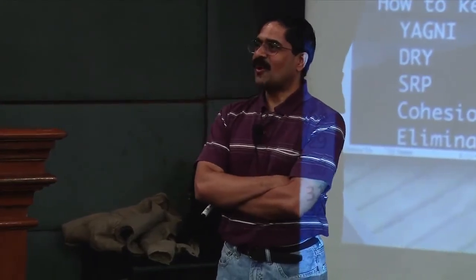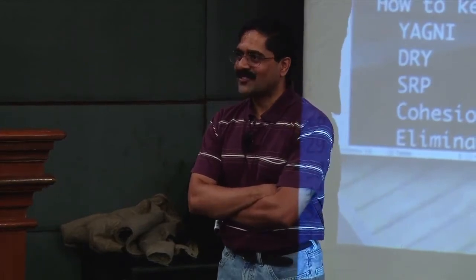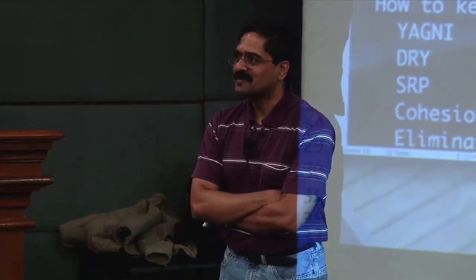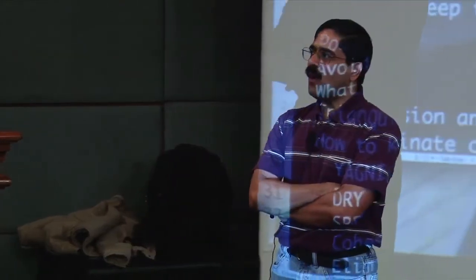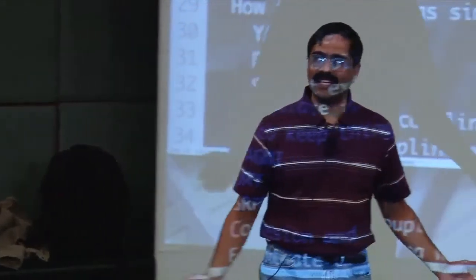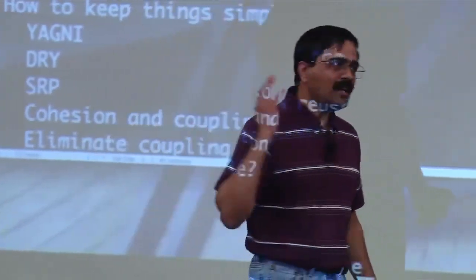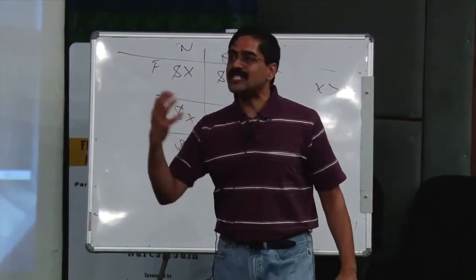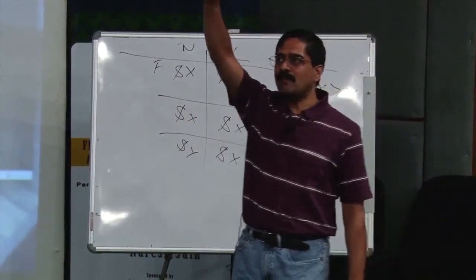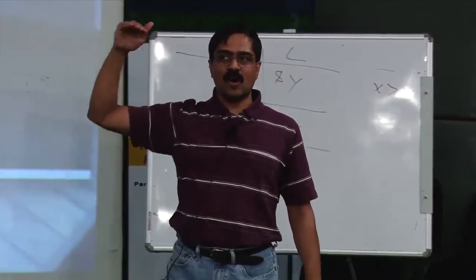Thank you. So the word is consider. Word is think. He didn't say do it now. He said it depends. Well, the first is how certain you are that you definitely need this feature. If you're 100% sure you need this, then the next question is how much do you know about this? Do you know a lot about this? How certain are you? So put a number on need and a number on certainty.